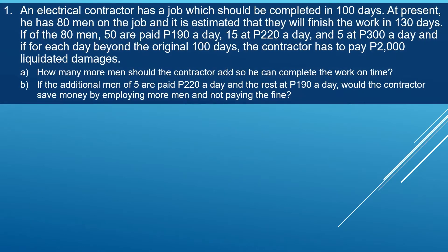For the first example, an electrical contractor has a job which should be completed in 100 days. At present he has 80 men on the job and it is estimated that they will finish the work in 130 days. Of the 80 men, 50 are paid 190 pesos a day, 15 at 220 pesos a day, and 5 at 300 pesos a day. For each day beyond the original 100 days, the contractor has to pay 2,000 pesos in liquidated damages. How many more men should the contractor add so he can complete the work on time?